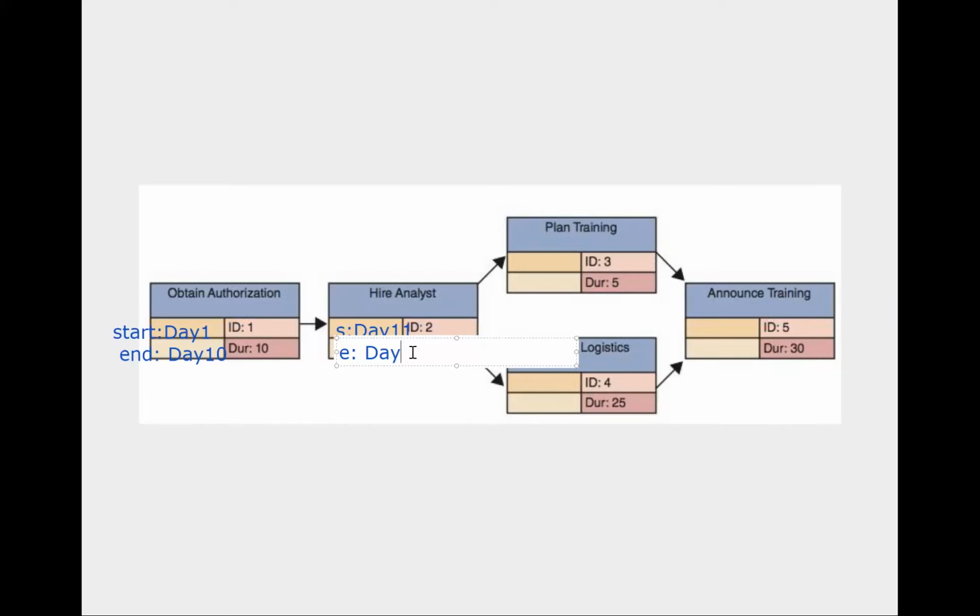Day number 40. Actually, the easiest way to do this is you add day 1 plus 10, 11 minus 1, 10. So here we have day number 11 plus 30, it's 41 minus 1, this is 40. This is another way to handle this. So I will put only day numbers. So what is the starting value here?